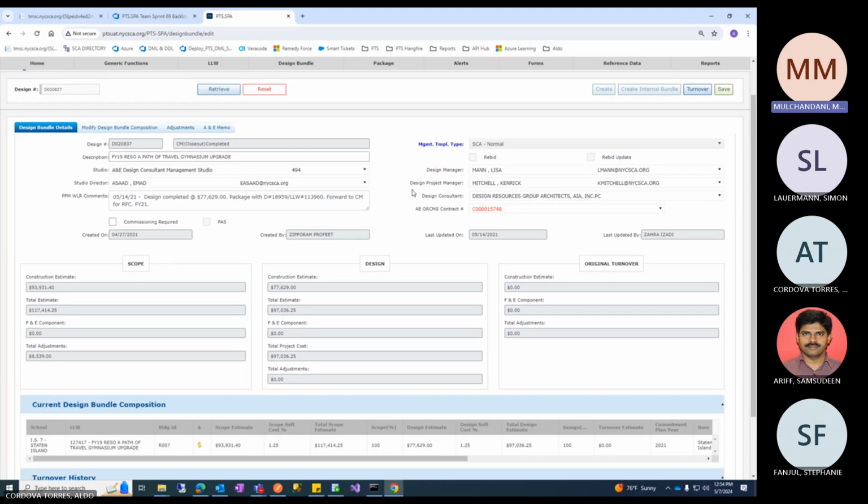So basically, when the scope end is added, in pre-scope, there's a difference. In pre-scope, when the end date was entered, it went to ready to forward status. And now the difference over here is when the scope end date is entered, it doesn't go to scope ready to forward. It goes to design inbox automatically. Why? Can anybody tell?